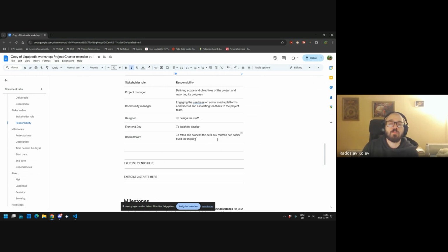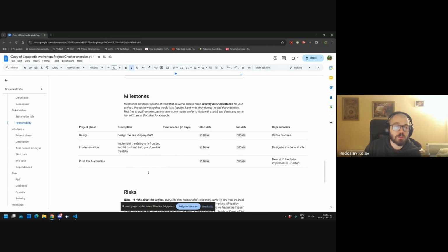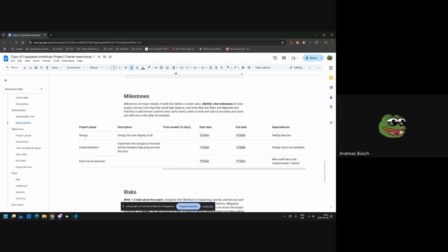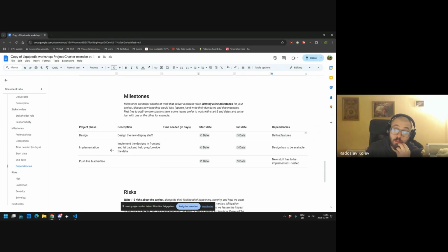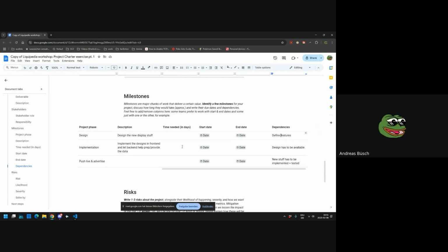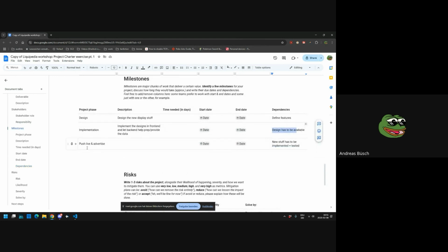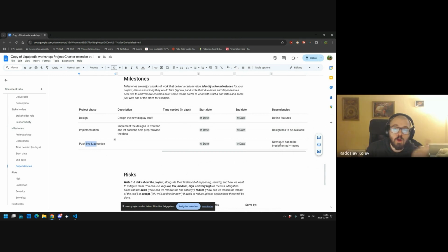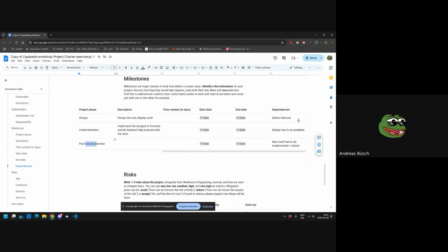All right. What are your milestones? What are your risks? I mean, obviously you have to design the stuff. Before that, you have to define the features. Okay, yeah, correct. Then you have to implement it. Before that, you have to have the design available. And then eventually you want to push it live and probably also advertise. Before that, you have to have it implemented and tested.